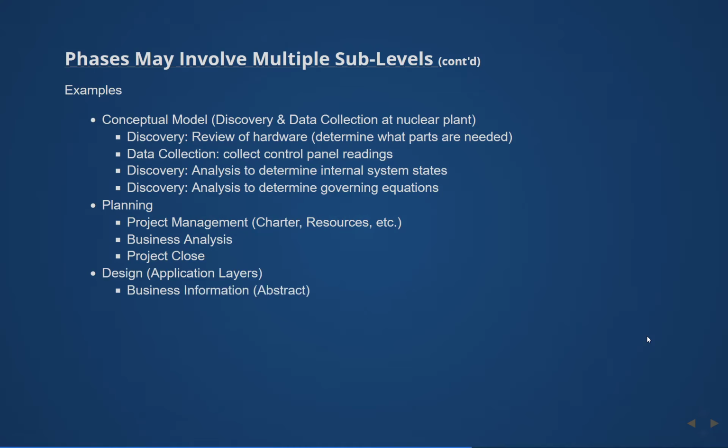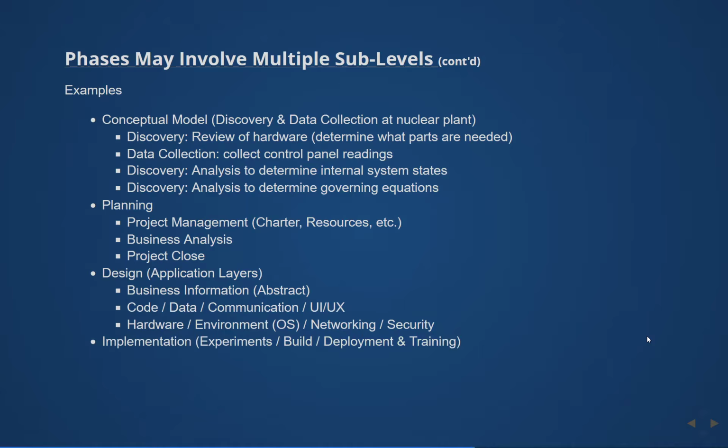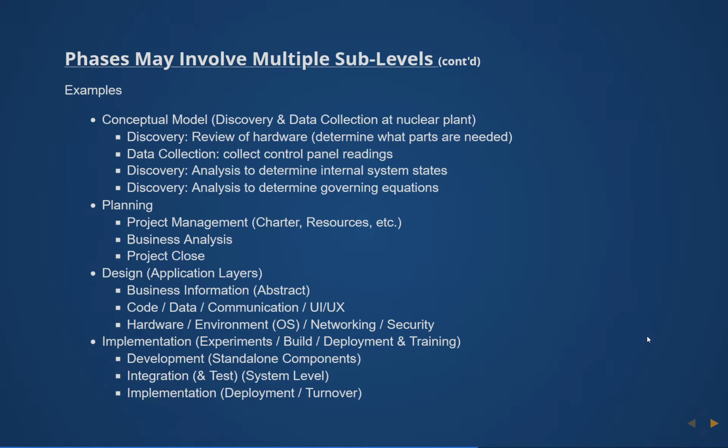If we're doing design, I already went through a 3-layer design, but there are many other ways you might need to do this. If we're doing implementation, we develop standalone components and we run individual tests on our desktop. Then we submit them to be integrated and tested at the system level, and then we do deployment and turnover in another set of testing.